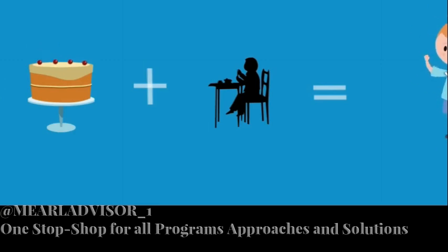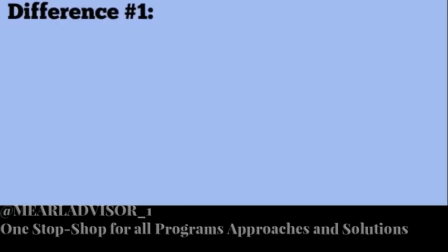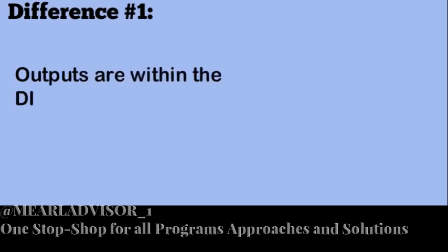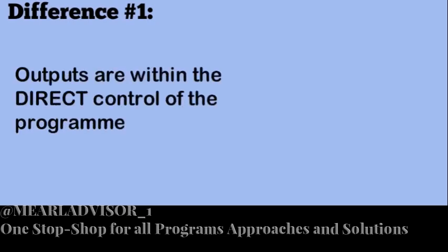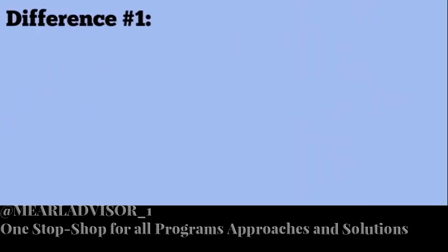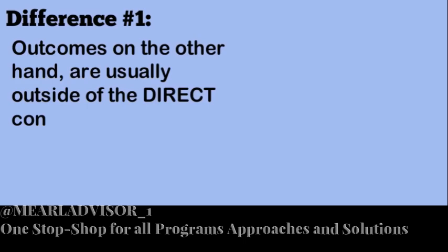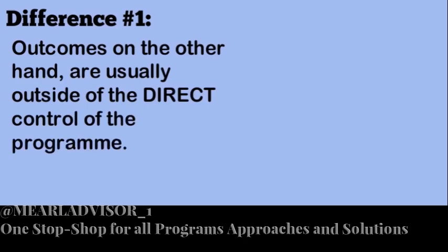One of the main reasons for this struggle is that the terms outputs and outcomes are often used interchangeably, or at least, vaguely. Project managers might think they're one and the same, or that they're just semantic nuances. But the truth is, there's a world of difference between the two. Outputs are the tangible products of your project, whereas outcomes are the changes or benefits that result from those outputs. Understanding this distinction is crucial for effective project monitoring and evaluation.